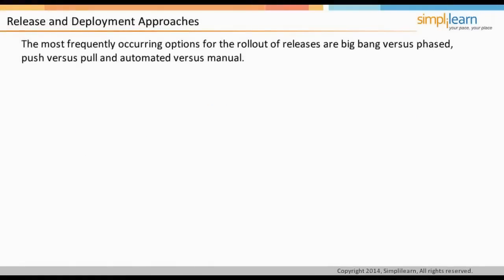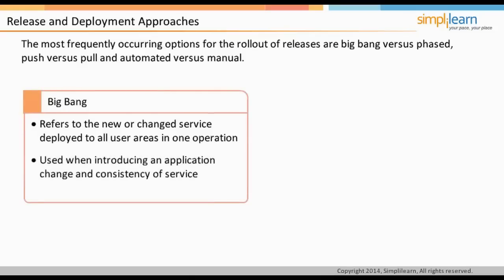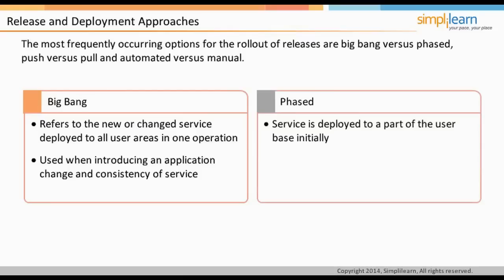Different considerations apply with respect to how a release is deployed. The most frequently occurring options are: Big Bang vs. Phased, Push vs. Pull, and Automated vs. Manual. The Big Bang approach deploys a new or changed service to all user areas in one operation, often used when consistency across the organization is important — for example, installing office software for 500 users at once. The negative aspect is that it increases the risk and impact of a failed release. The phased approach deploys the service to a part of the user base initially and repeats for subsequent parts via a scheduled rollout plan, used for example in retail organizations introducing new services in manageable phases.